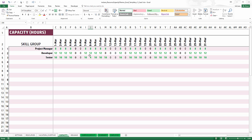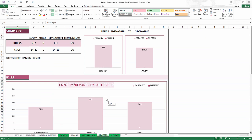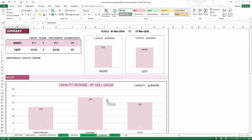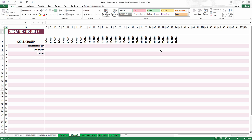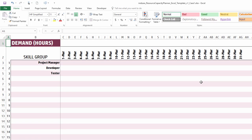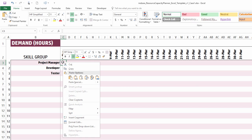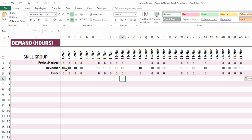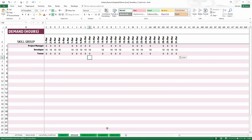This is very useful information — it allows you to have a meaningful conversation with your leadership and say: this is our capacity for next month, and this is what we are capable of delivering in hours for the entire month of March. In most cases you already have some demand — a certain amount of work that needs to be done. That's where the demand sheet comes in. I'm going to enter demand assuming it's consistent: eight hours for Project Manager every workday, ten for Developer, and a set amount for Tester.